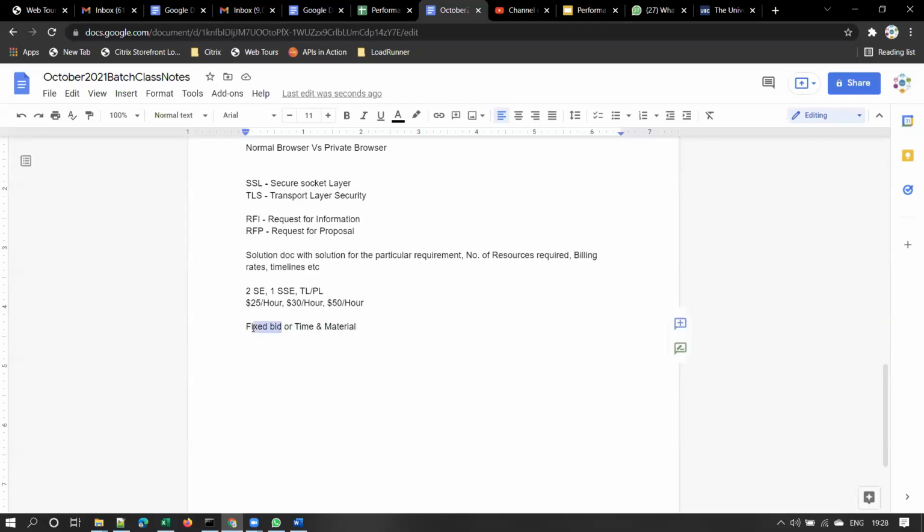Yes. So in the same way, service-based company may tell you we will do the whole assignment, whole project in some $10,000 or $20,000, something like that. Or they may also suggest you this model, time and material. So in this time and material, these come up, right? For software engineer, $25 per hour. For senior software engineer, $30 per hour. A team lead or project lead, $50 per hour. So based on the number of hours of effort, we will be charging. Client will be charged based on the time and effort. Time and material means time and effort here, right? So these are the different bidding models.